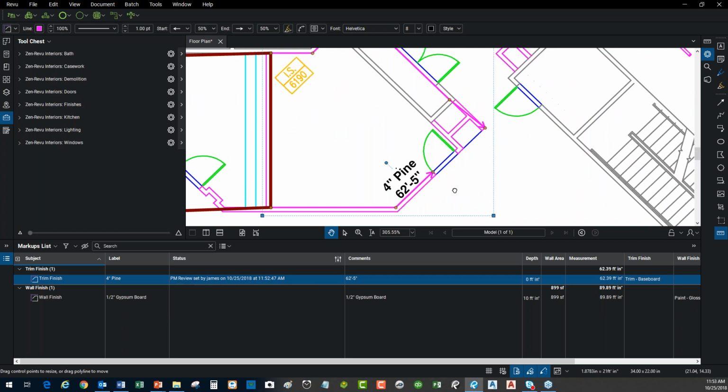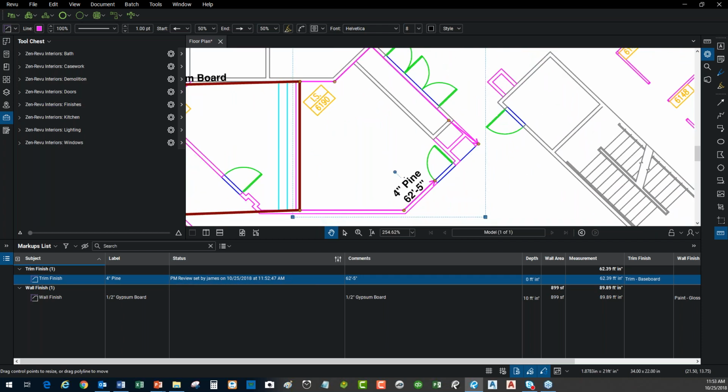Now, what I want you to watch is I just put it in here so you guys can see. I can actually have it change text and color so I can get visual cues as to what state things are in. So I can easily say, hey, the project manager approved this. And you see when it changes that, it changes to green. So I know this is an approved takeoff. It doesn't change my values or anything else. I'm just changing the color state. So visually I can look and say, okay, he's already approved that one.